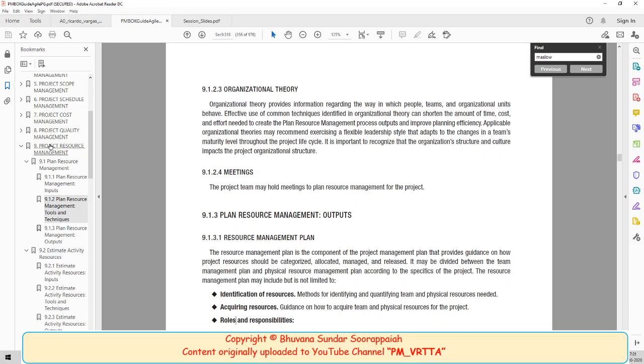So even if I do a Superman's or Wonder Woman's job, I will need a minimum of 3 days. That is my optimistic estimate. Whatever the upside and whatever things go wrong, it will not take more than 10 days. That's the worst case, my pessimistic estimate. Now, you know from the past that your optimistic scenario and pessimistic scenario are equally likely to happen. But what is the most likely scenario?